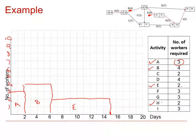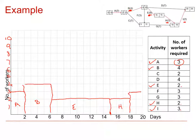The next in our critical path is H. H has a duration of 3 and requires 2 workers, so 15 plus 3 is 18 — we draw H from 15 to 18 at height 2. Then last but not least, I has a duration of 2 days with 3 workers, so the bar requires a height of 3 and we finish at 20 days. There's I completing the critical path.